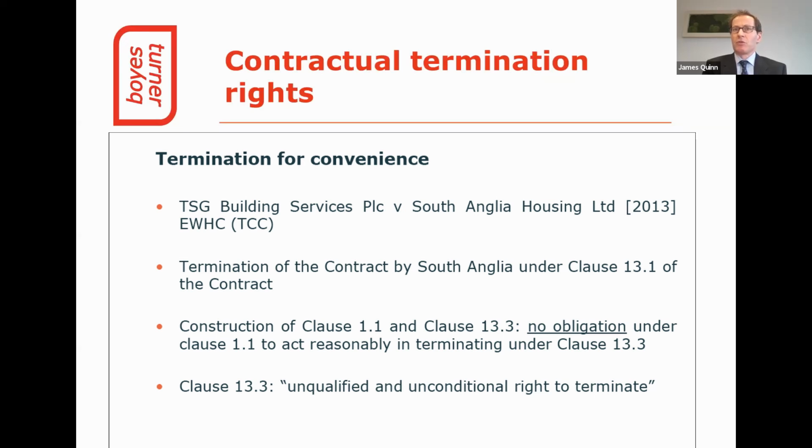In applying the established rules on construing contracts, the judge concluded that on a proper construction of Clause 1.1, there was no obligation on South Anglia to act reasonably when exercising the right to terminate under Clause 13.3. In other words, the reference in Clause 1.1 to the parties acting reasonably did not apply to the termination right in Clause 13.3. Clause 13.3 amounted to an unqualified and unconditional right to terminate.